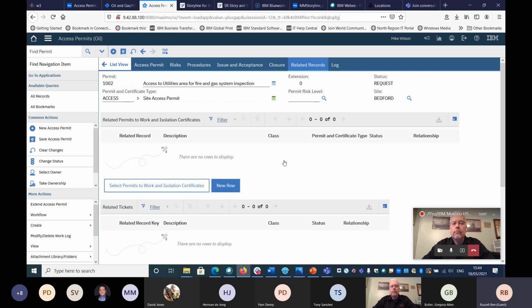I think the key thing around the safety-related applications is that there's always some process change as well, and cultural change introducing safety-related capabilities. So it's often better to increment that ability. You might start off with an initial implementation that was a few months, but if you went through and implemented all the modules, over time you could be well over a year doing that if you're implementing everything.